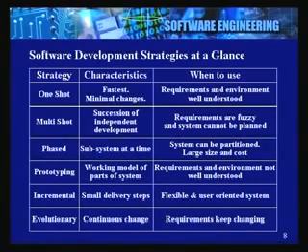The next particular approach is a phased approach. Here what will happen is the project is too large, we can conceive it together, but we may not be wanting to commit all the resources at the same time. In which particular case what you can do is conceive the project as a whole, but execute one phase at a time.